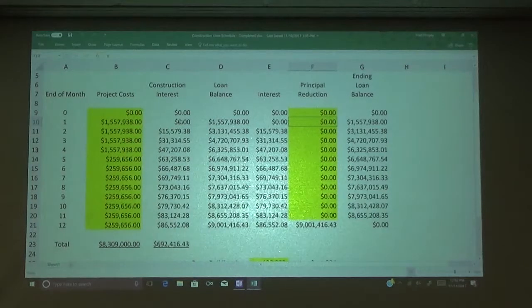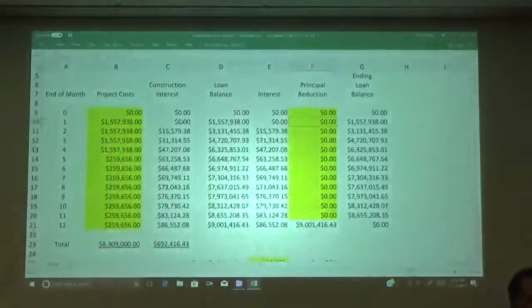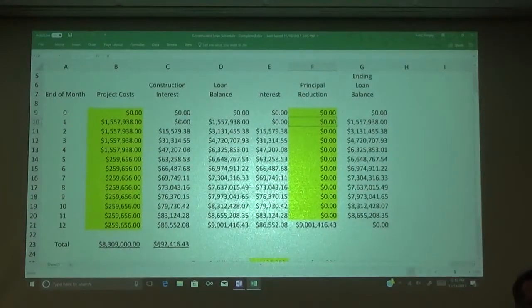It could be the sort of thing where you get into the project and the overall project costs are escalating beyond what you had originally agreed upon with the lender. And the lender says, the land that you put into the deal as equity maybe isn't enough, so I'm going to require you to put in a little additional equity during the actual construction period, because I'm getting worried that the overall cost of this project is ballooning to a point I'm not comfortable with. Does that make sense?